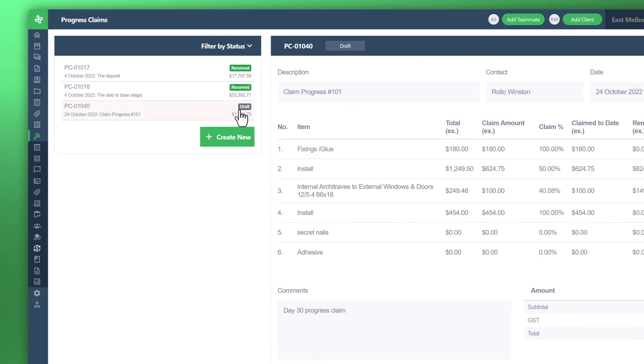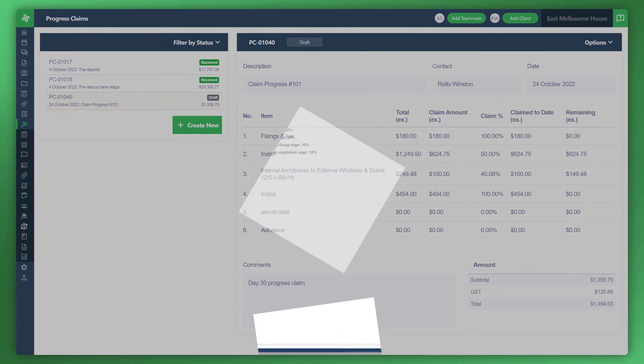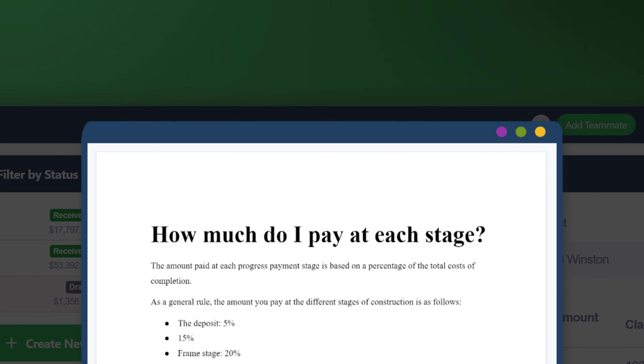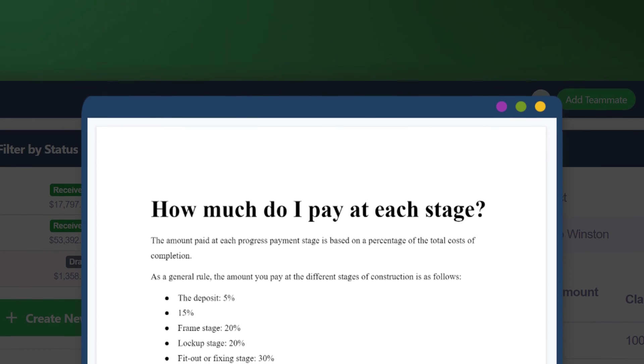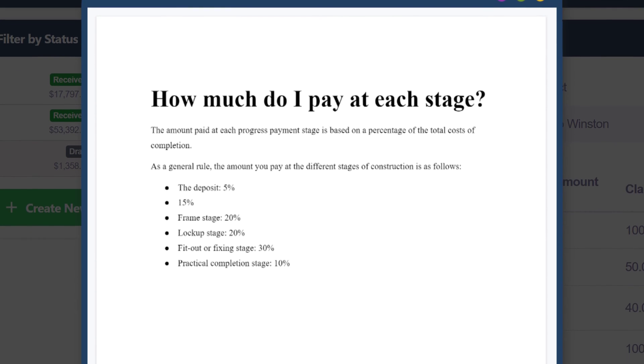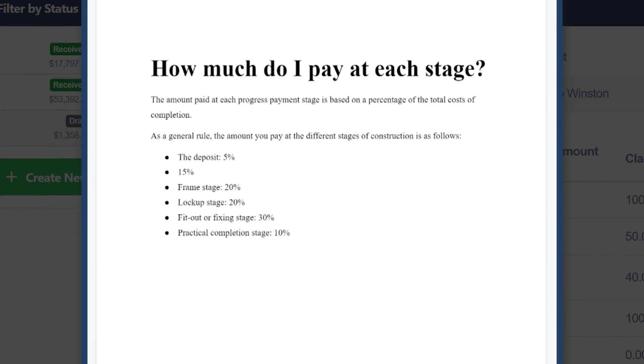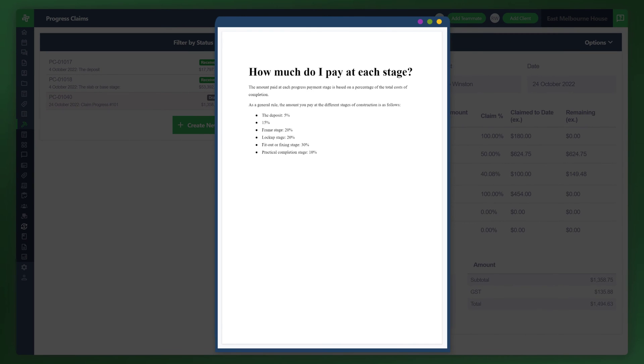We understand that in WonderBuild the traditional way of managing your claims or progress claims is done via various milestones. Let's take a look at a classic example of that. You can see this is a way that a lot of builders would manage their progress claims. A good question is how much do I pay at each stage? As a general rule, the amounts you pay at different stages are as follows: the deposit 5%, then 15%, then the frame stage 20%, lockup stage 20%, et cetera. Each builder of course has their own method of progress claims or own process. Perhaps you'd like to mimic something like this.